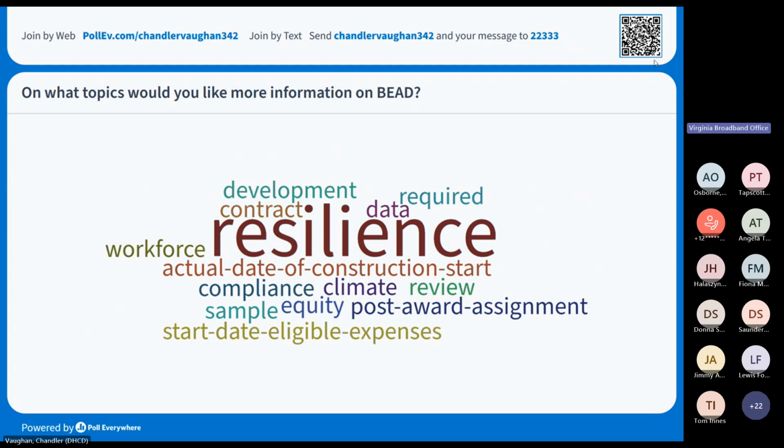Once that final proposal is approved by NTIA, which we hope is in late 2025, that's when we'll be able to start having pre-contract discussions with broadband providers to get going and, with the pre-contract phase, communicate the requirements, communicate things like the environmental review, any remaining BABA compliance measures that need to be taken account of. After that, once we get you under contract, we think that's going to be by early 2026 in terms of real construction start for the BEAD program.